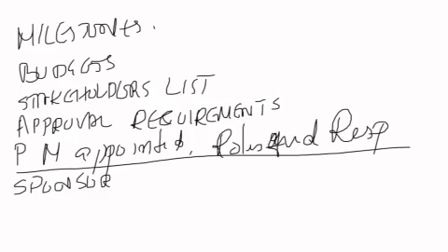Another key thing is, this is the only official document, approved by the senior management, which states the name of the project manager very clearly and the roles and responsibilities of the project manager very clearly.